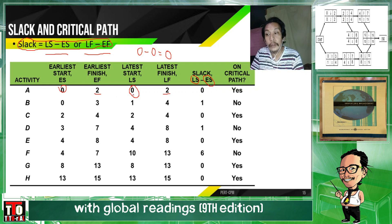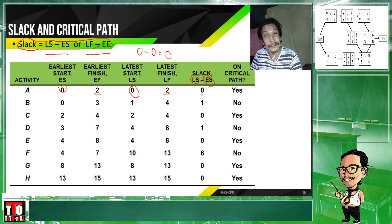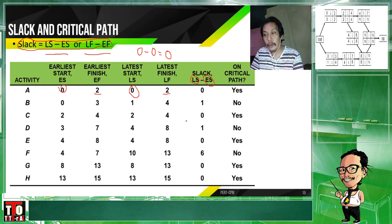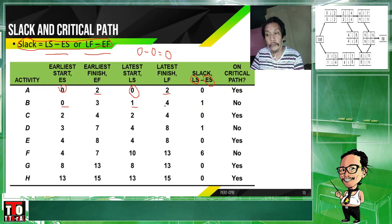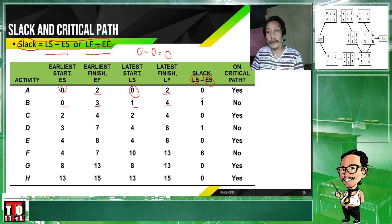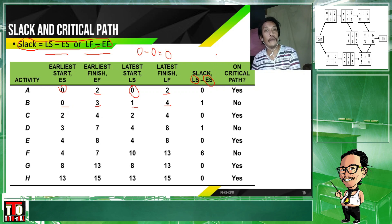2 minus 2 would also arrive at 0. Another example — I just want to prove that either of the two formulas gives the same answer. For Activity B: latest start of Activity B is 1, earliest start is 0, so 1 minus 0 is definitely 1. And LF minus EF: 4 minus 3 is also 1. We just follow the formula to get the slack value.